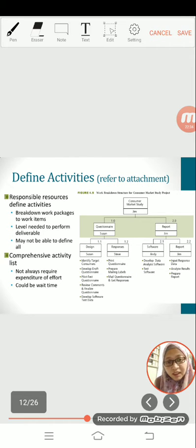What other activities need to be done in the design activity actually? So they list out all the activities. In the design, the person in charge needs to identify target consumer, develop draft questionnaire, pilot test questionnaire, review, comment and finalize questionnaire. Also develop the software test data. So this is how we define the activity. It means that for every single activity, we need to know what are the specific activities to be done for that kind of activity.